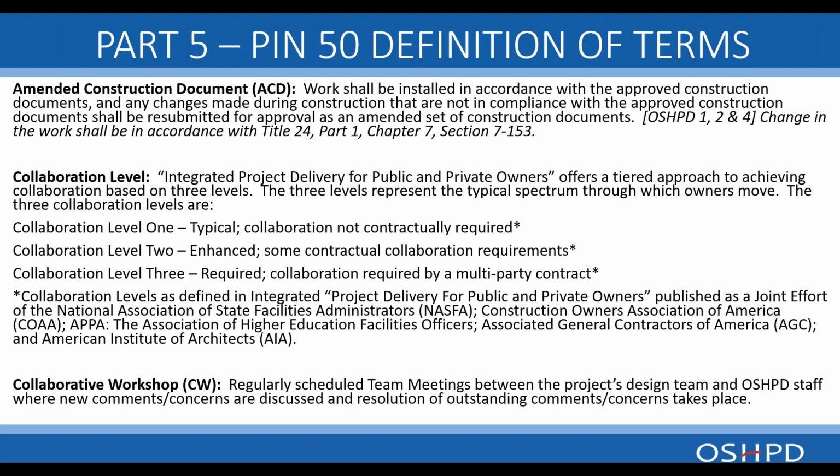So going down the list, we start off with amended construction document, which we probably all know is the old change order, which is basically any changes made during construction that are not in compliance with the approved construction documents. These shall be resubmitted for approval as an amended construction document unless it's considered a non-material change.